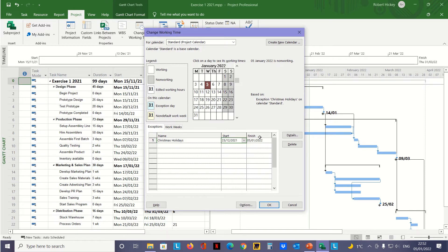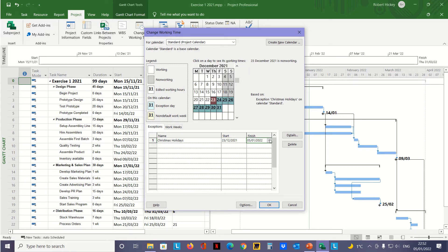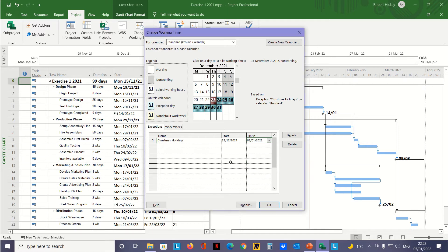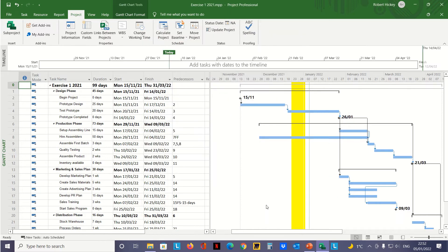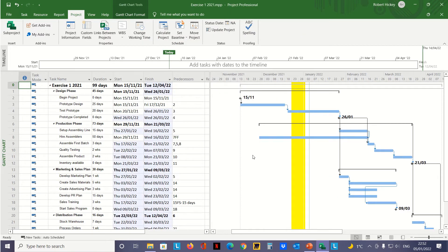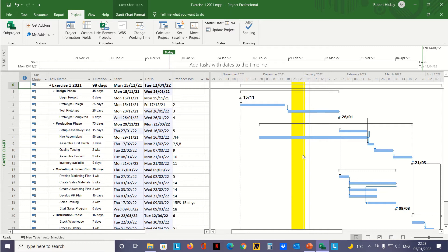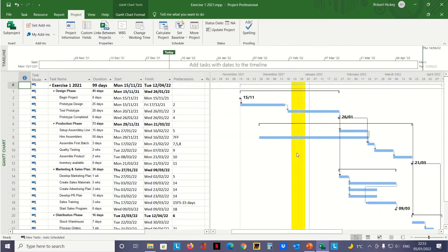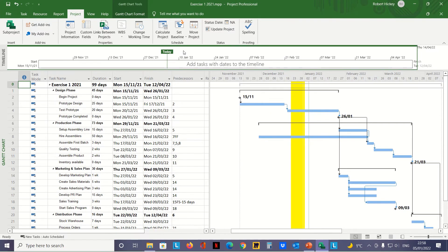Then in the Finish column, we click in the cell under Finish and click the dropdown arrow. This time we're looking for January 3rd, so the holidays will run from the 23rd of December to the 3rd of January. Click OK. We can see straight away that the dates have highlighted because some dates have changed. We can also see that the holiday section has been highlighted. If we zoom in, we can see all the weekends and the big Christmas holiday highlighted in yellow.